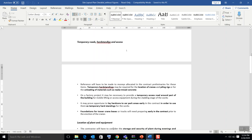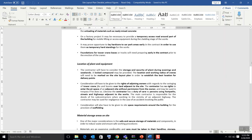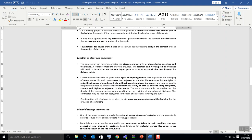You may not need temporary roads, but within the site you need some kind of access. Since it is a ten-storey building, you need a way to go up across floors — staircases are not constructed at initial stages, so transporting material through staircases is difficult. Therefore, you need a transportation system for the upper floors with a separate location adjacent to the main project structure.